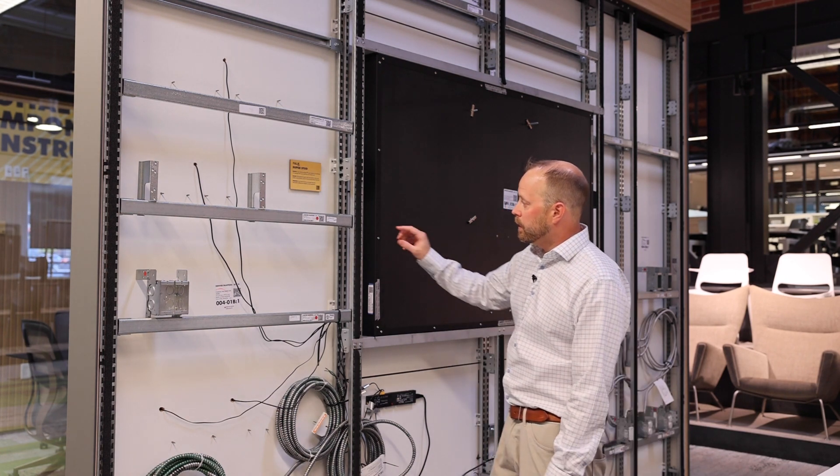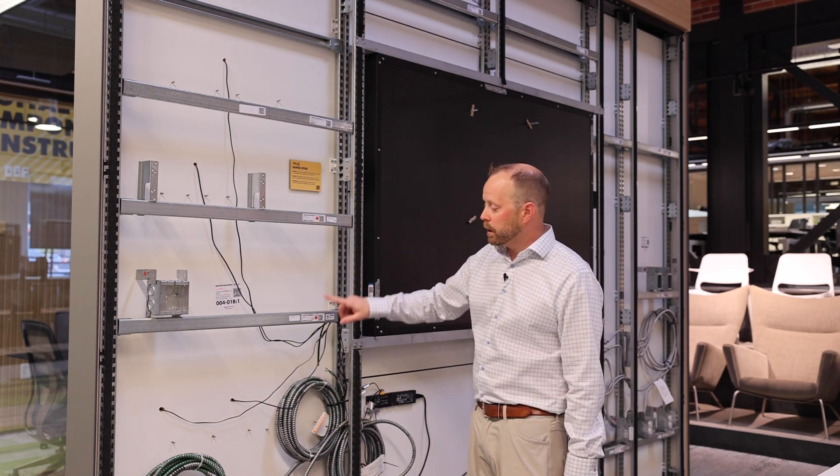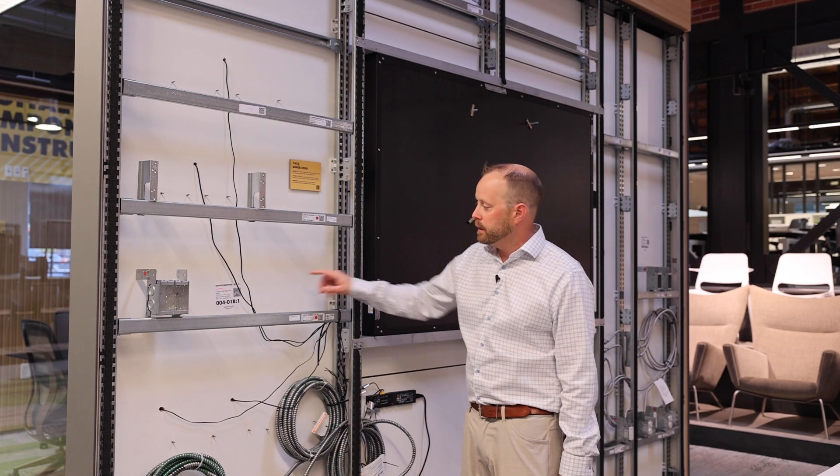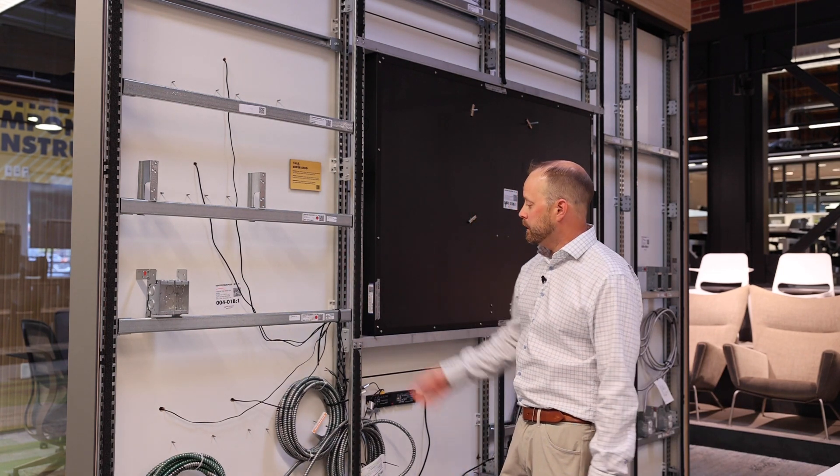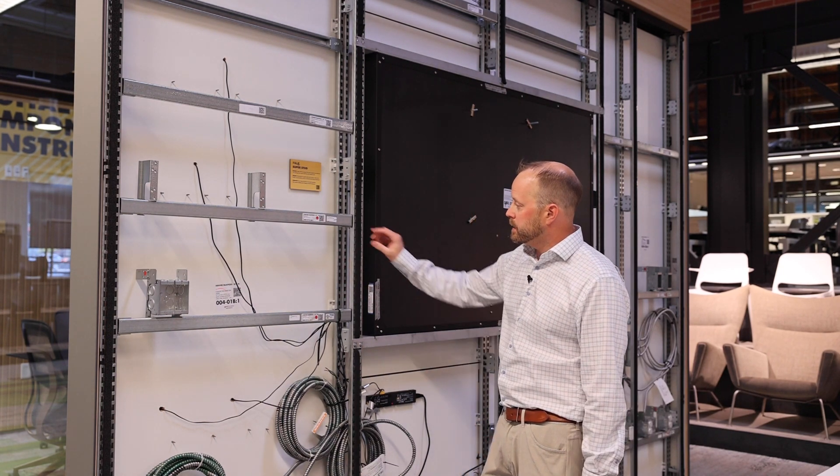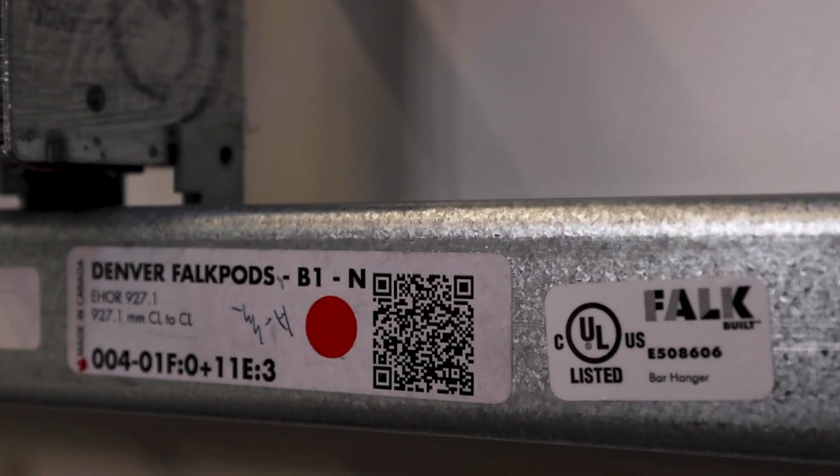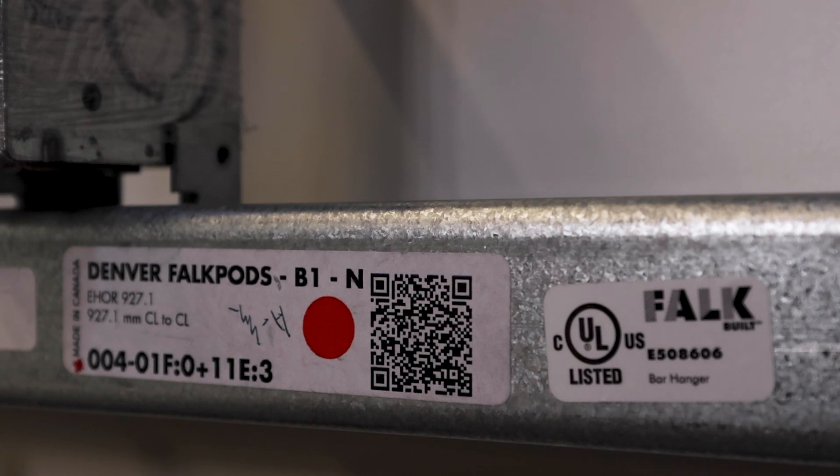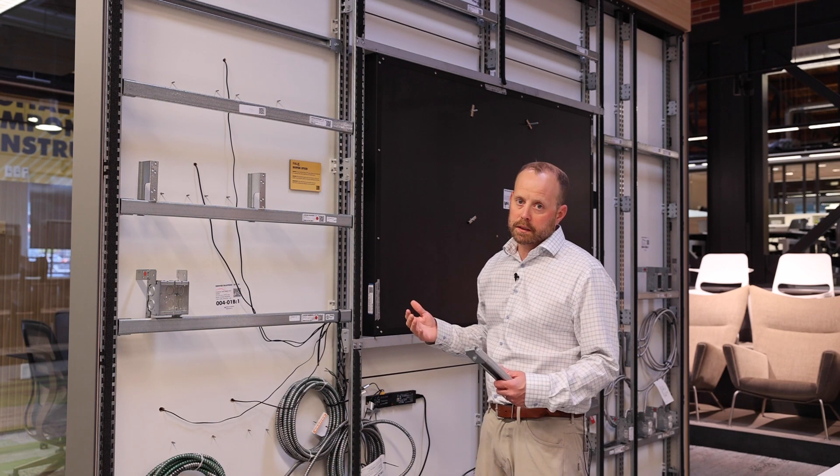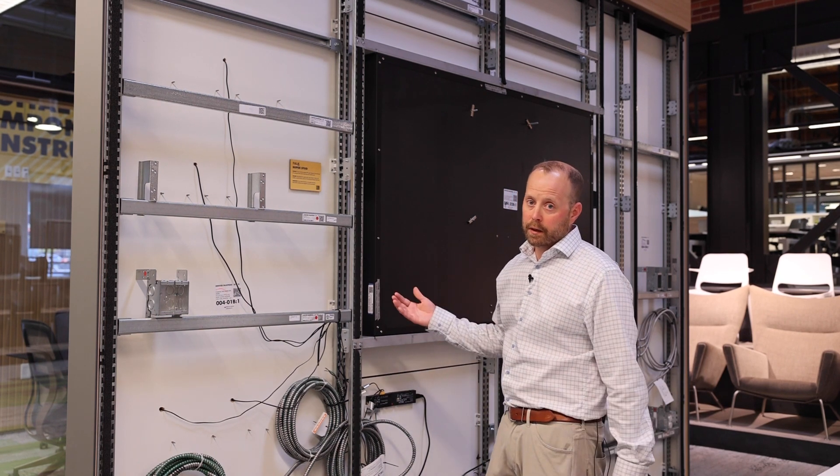You'll notice stickers with QR codes on every piece, every digital component you see. This gives us, as the local branch, visibility to where the product or solution is in the factory. We can see if our order is bundled together and loaded on the truck.